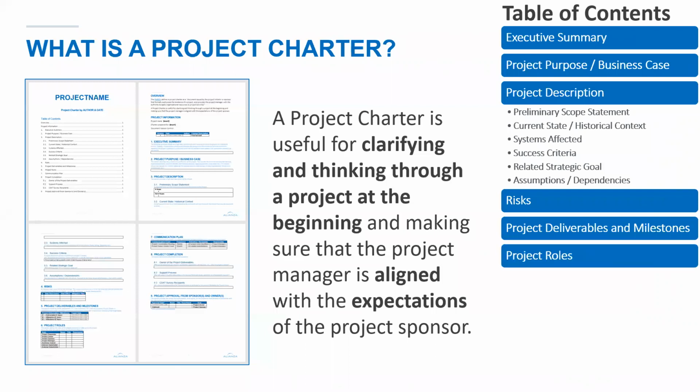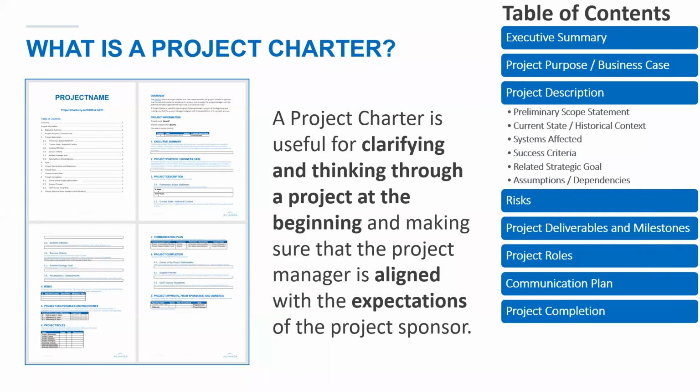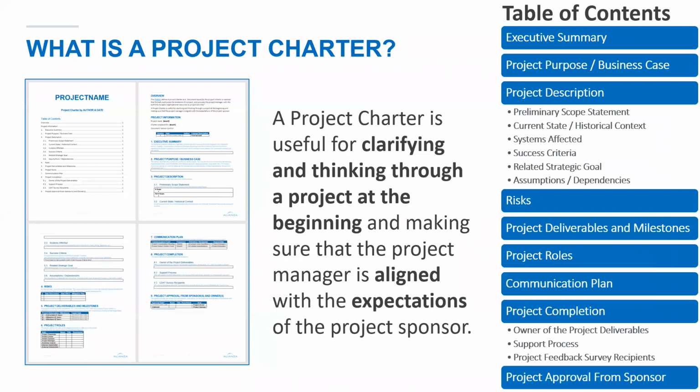Project roles, who's going to be involved, what their roles are going to be. We talked about the roles title project slide earlier. The communication plan, how do we plan on keeping everybody up to speed? Is that just a weekly coordination meeting and a weekly status update, or is it going to be different, more or less than that? Project completion, just planning at the beginning for how we're going to close this thing out, like who's going to own the project deliverables, who's going to support the processes if there are any, who do we send the feedback survey to at the end.